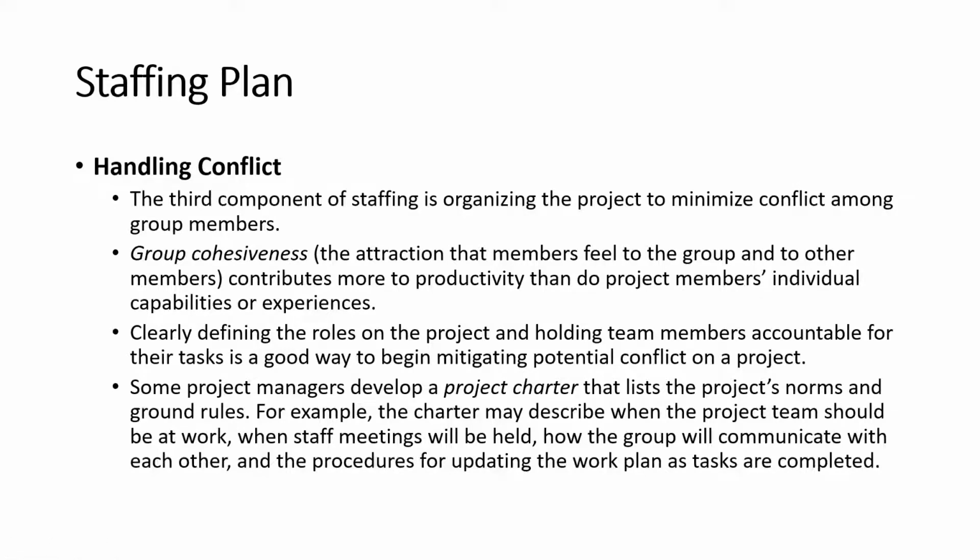Okay. Some project managers develop a project charter that lists the project's norms and ground rules. For example, a charter may describe when the project team should be at work, when staff meetings will be held, how the group will communicate with each other, and the procedures for updating the work plan as tasks are completed.